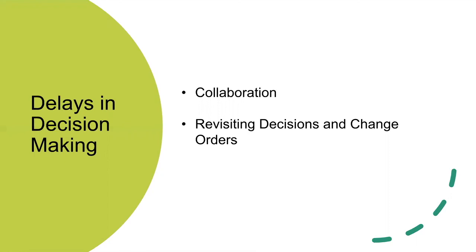Change documents must be made if deliverables of the project change. The board should create a record for requests and approvals of the change. If procedures are not in place, delays to the project will occur.